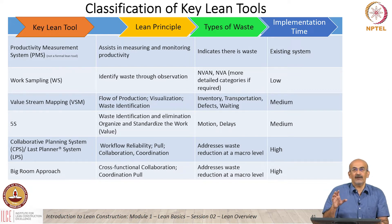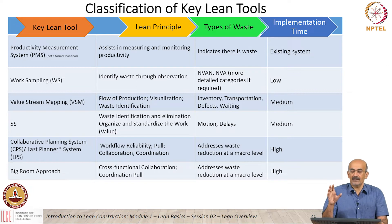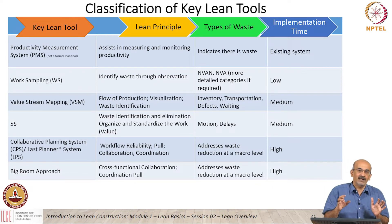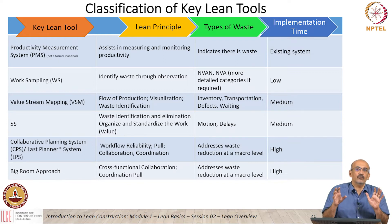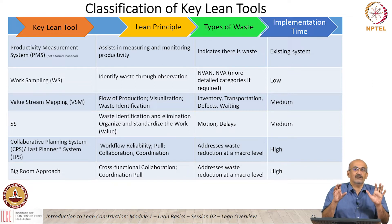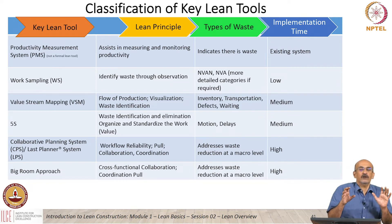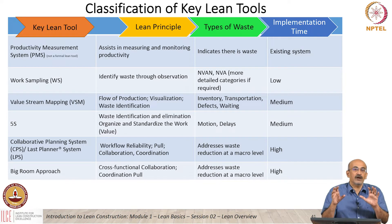When we go into work sampling, it is a tool that we can use to identify waste through observation. We are able to identify waste in broad categories: non-value added but necessary, and non-value added. In more detailed categories, we can look at idle time, transport, and other categories of waste through observation. Work sampling does not take much time to train someone to do, and it helps us identify the actual visible waste on a site, though it does not look at inventory and other kinds of waste which are also very important.